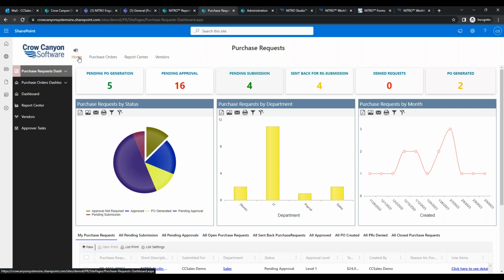I mean, we talked about earlier where the supplier is updating the prices before the purchase request is created. But once it's ordered, there's another communication with the vendor and the supplier, like when it's going to be delivered. And you were talking about line items, being clear about whether line item 1 was delivered, or half of it was delivered but line item 2 has not been delivered, those kinds of things, right? Right, exactly. And then also providing lead times for each individual line item as well.